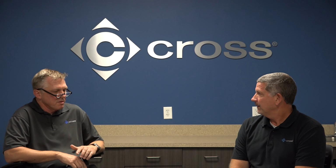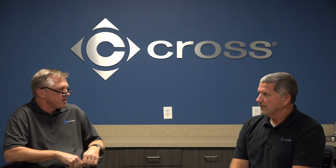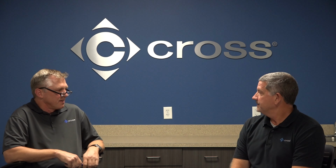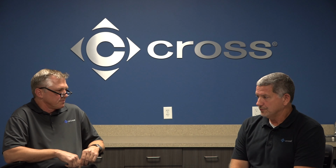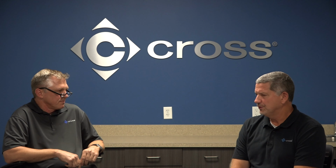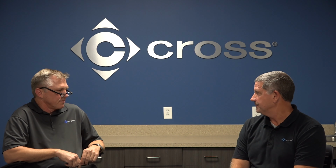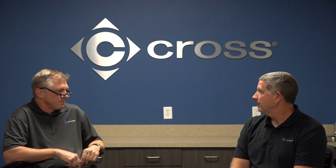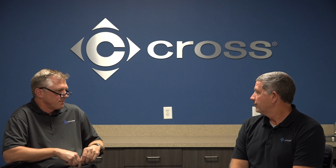This is a great way for our customers to help lower risk and improve efficiency and hire us to do something that they don't have time to do. Yeah, basically we take that and we will keep all that information for them. And we've actually had customers come back to us and do this in phases, where they want to take the emergency items first, and they'll categorize these as top priority, 2 priorities, and 3 priorities. And it may take a year, but we work with them to set the objective to get those done when they need to be done and get the equipment on order so they have it on site when they're able to do that during the outages.